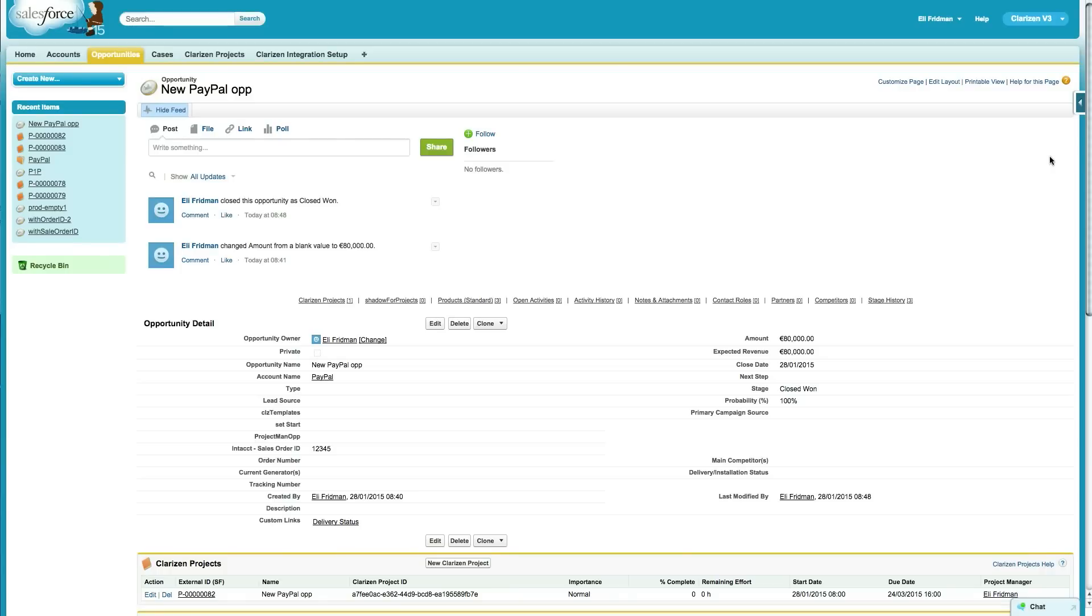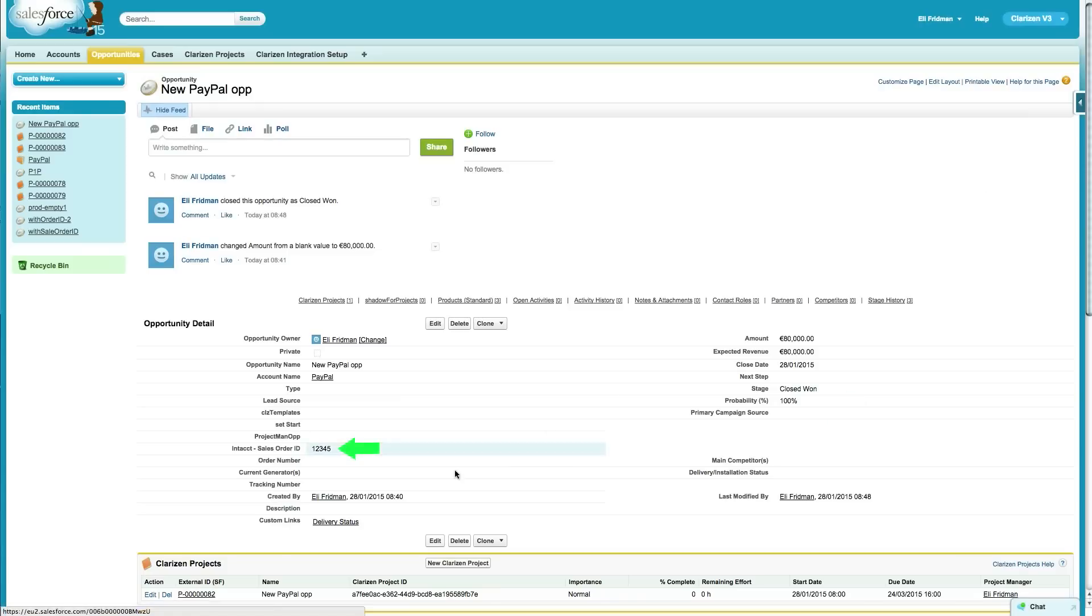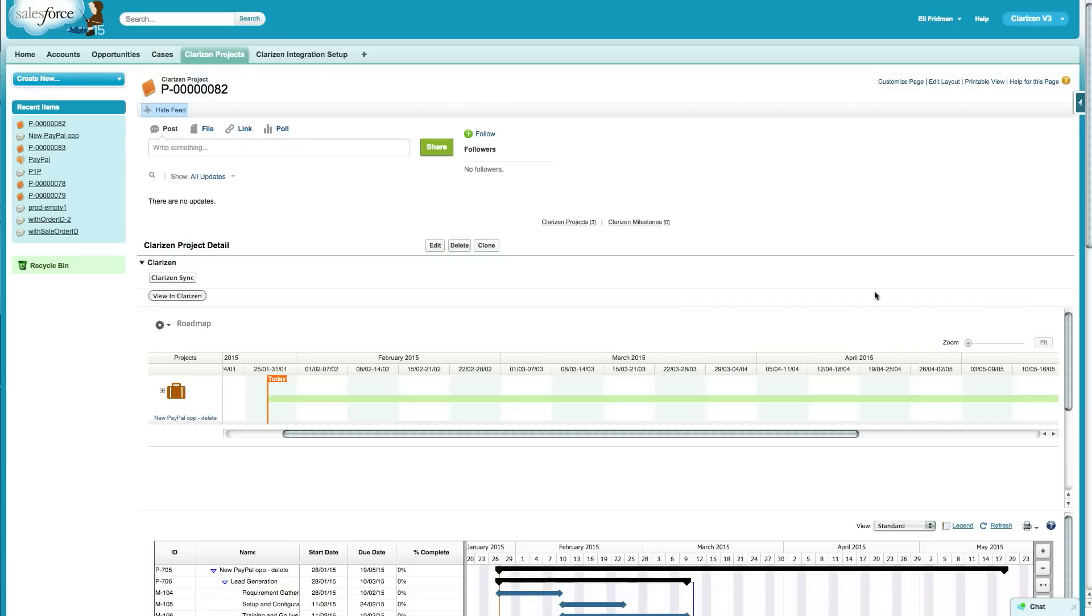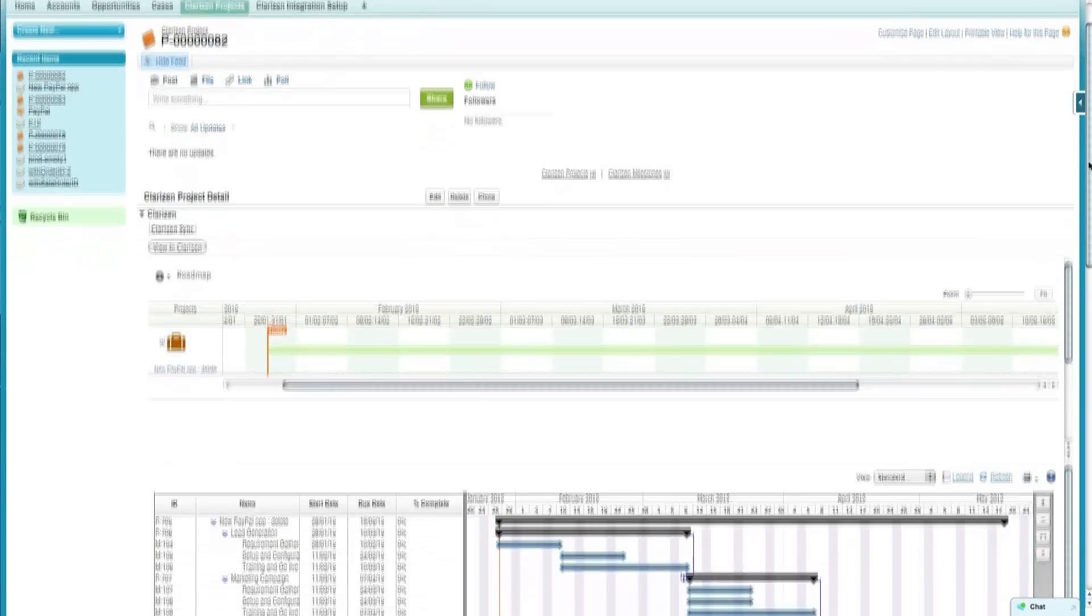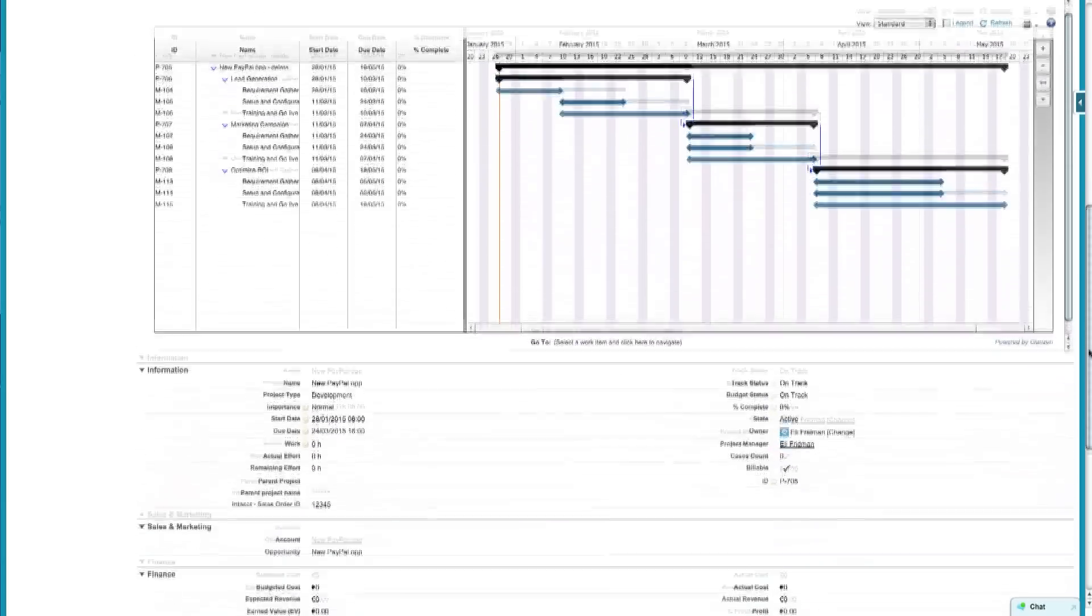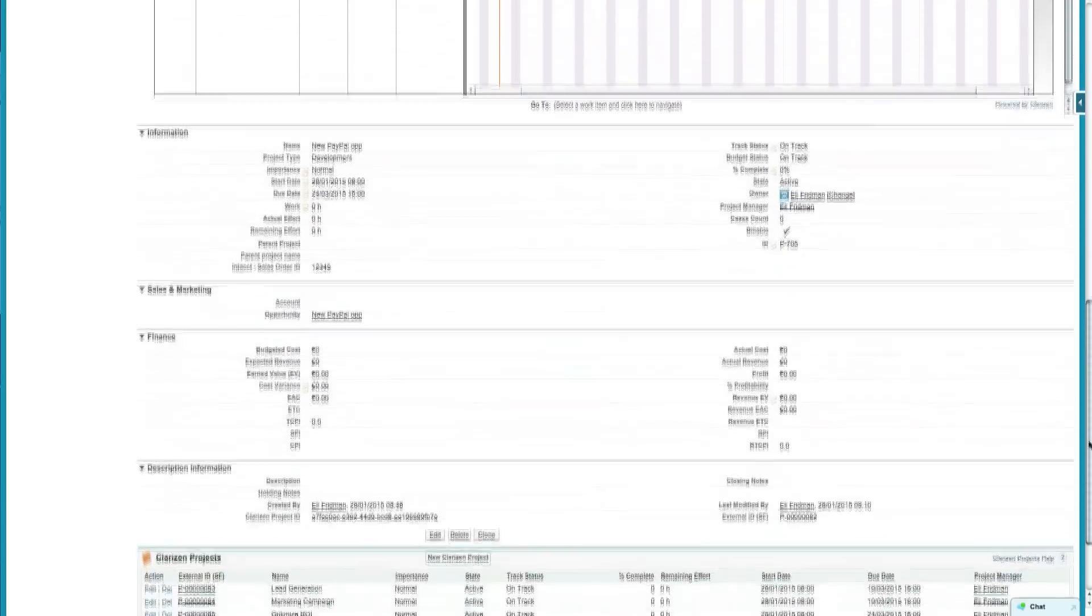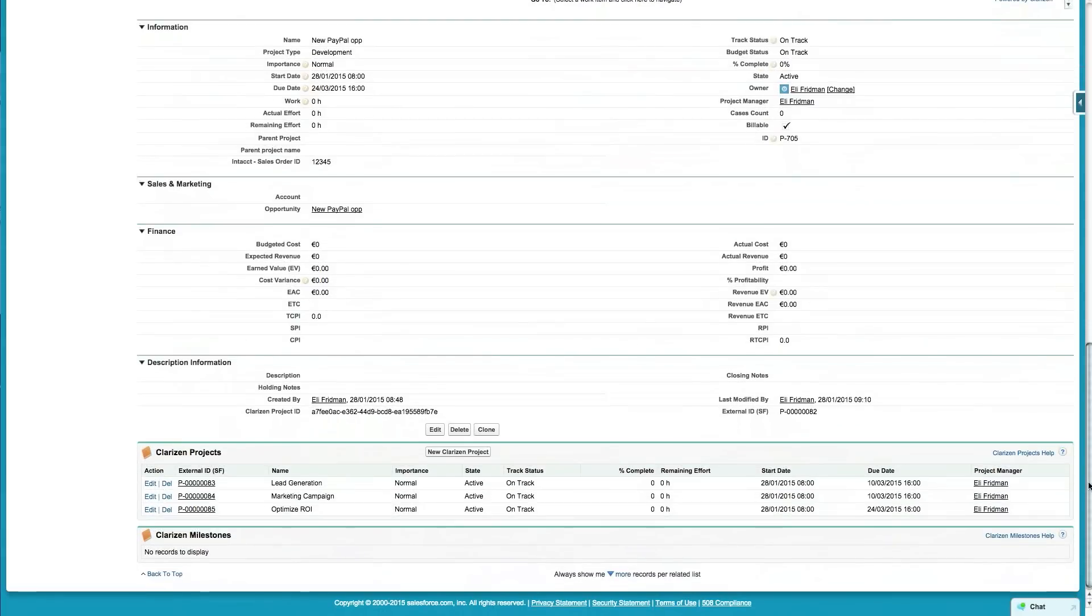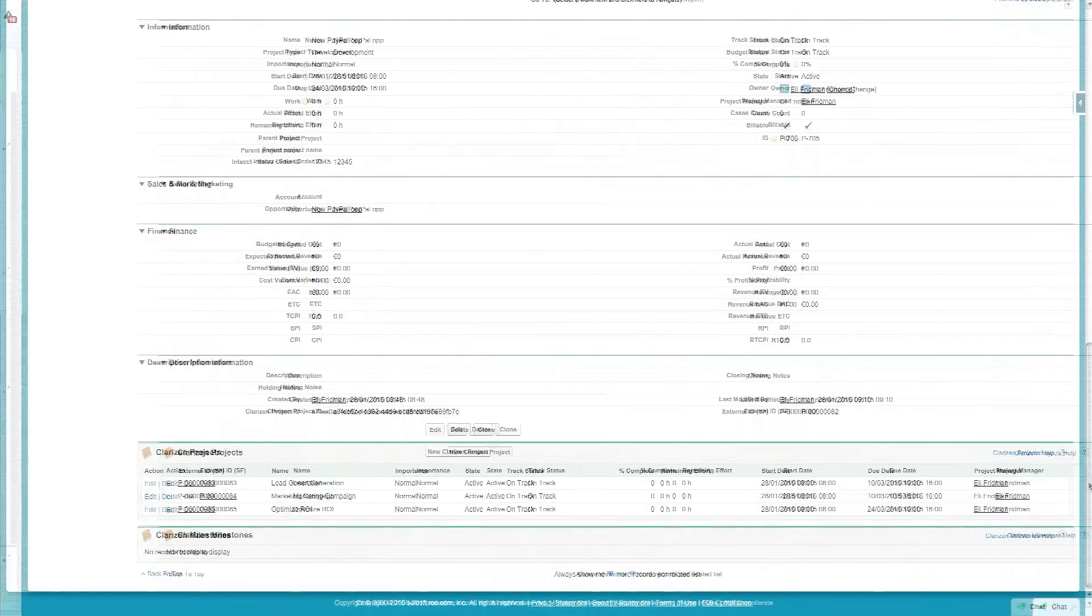The process starts with the salesperson creating an opportunity in Salesforce. Once the opportunity matures, an Intact sales order ID is captured on the opportunity via the Salesforce Intact integration, and a portfolio with sub-projects is created in Clarizen utilizing the Salesforce Clarizen integration.